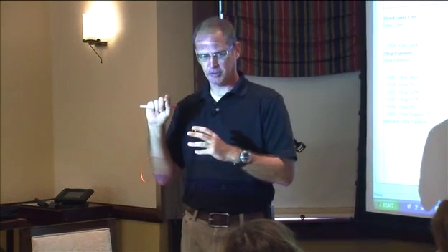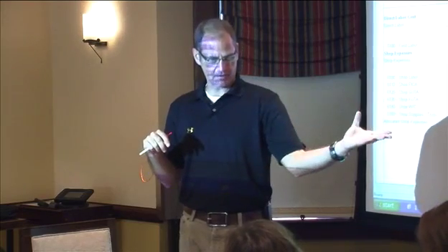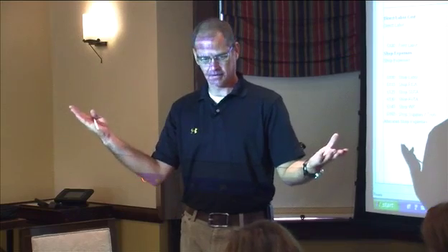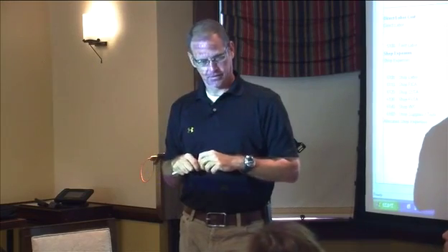I'm also going to put my direct labor costs there. I'm going to do nothing but subcontracting costs on one job, and nothing but direct, self-performed work on another. Then I can actually compare those two cost codes and look at the dollars going into them. Of course, we have to track some kind of quantity, right, to find out whether or not we're profitable.